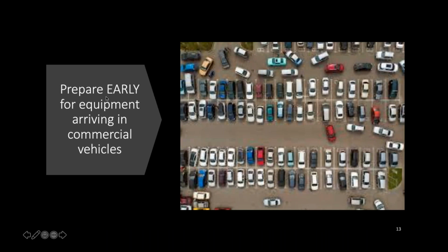Another thing you have to consider, and the project manager once again has to wear a lot of hats, is that he has to predict what's going to happen in your parking lot. Maybe you get there after hours, or maybe they're closed because of the damage for that day, and you prepare for all this equipment to arrive at 9 o'clock the next morning. Then you get there at 9 o'clock the next morning and this is what you see. Now the employees have come back to work, or customers are coming to other stores, and you cannot get a box truck in, you can't get large trailer trucks in. There's just no room to move and no room to get around in there.